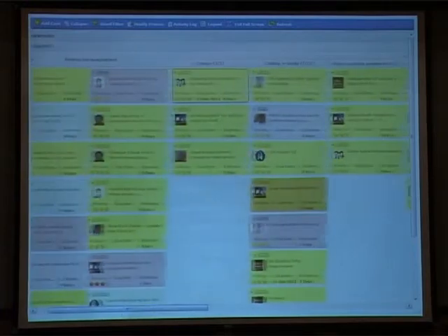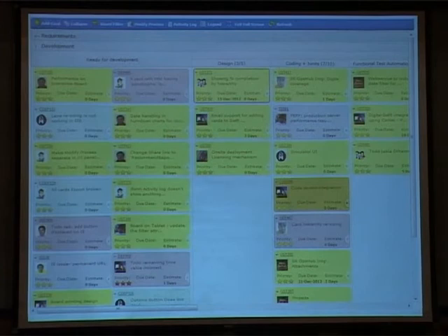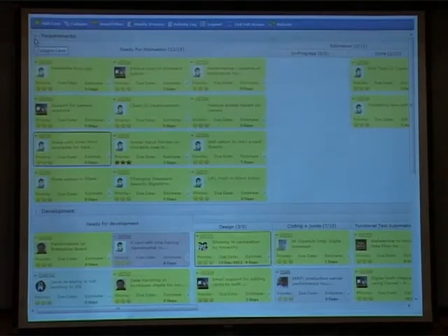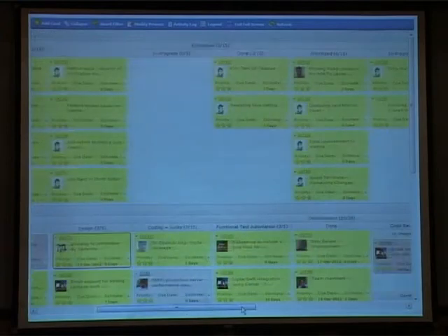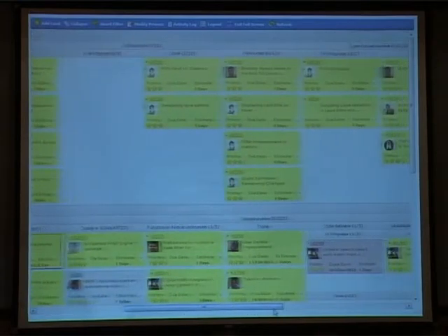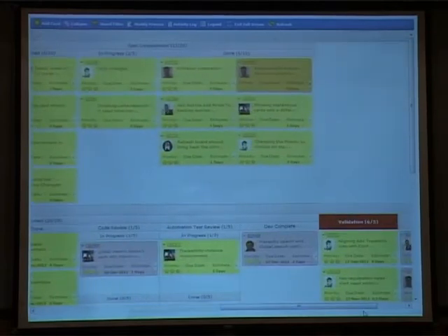One of the other things is a concept of what we call swim lanes. And swim lanes essentially lets you define the value stream for different kinds of work on the same project board. So in our case, our requirement process is a very different value stream. As you can see, product management guys would first identify the user stories that they will give to us for estimation. And then from estimation, it goes to prioritization, spec development, and finally it gets ready as spec and estimate is ready to go.